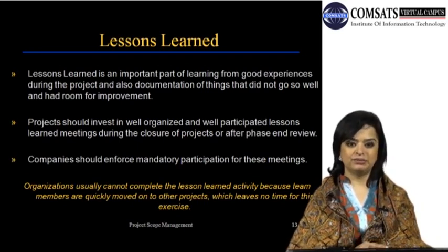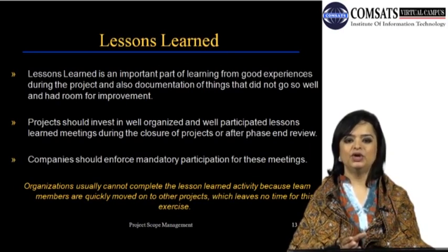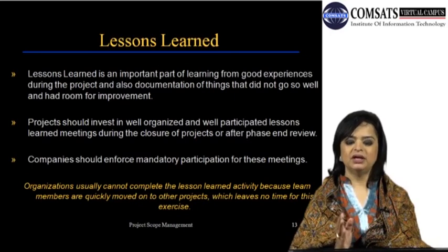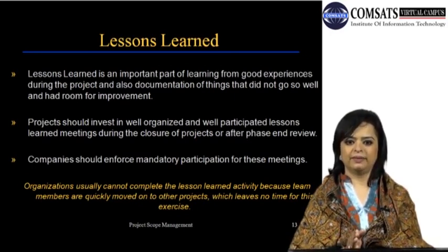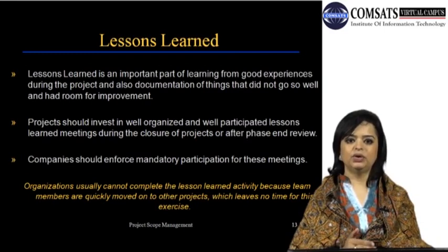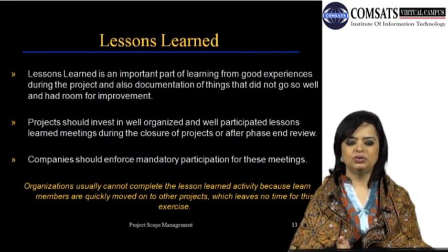Coming back to the initial statement saying it should not only be done in the closure phase, the reason is that during the closure phase, not only are the team members eager and ready to move on to different projects, you as a project manager are also actively looking out for a new project or may already have one under your belt and you are in the initiation phase of it, thus leaving no time to do certain activities like the lessons learned activity.